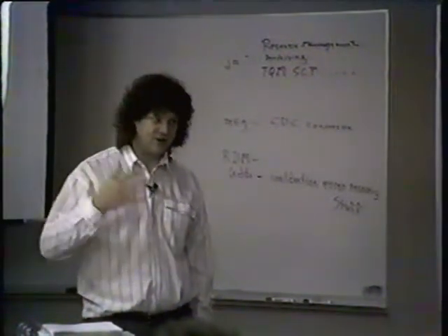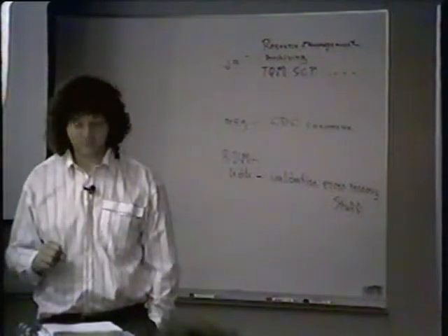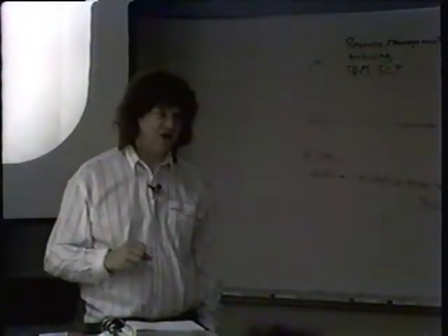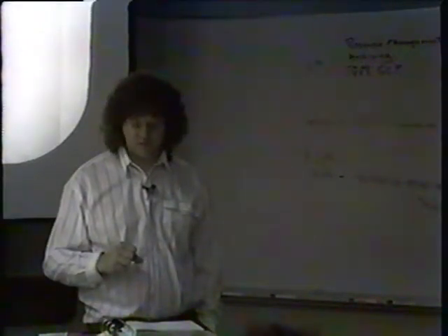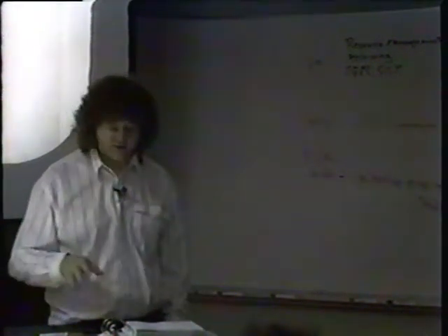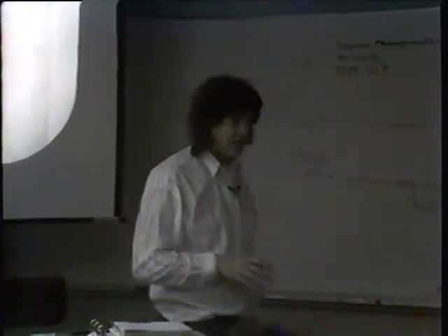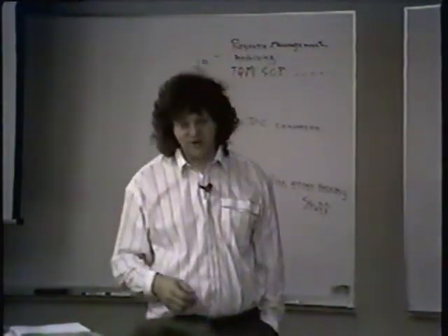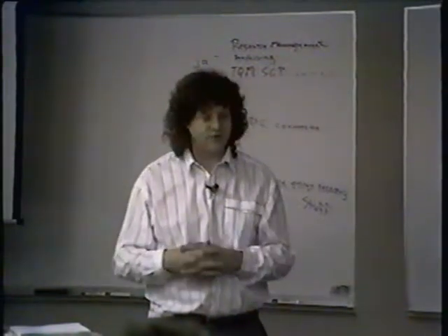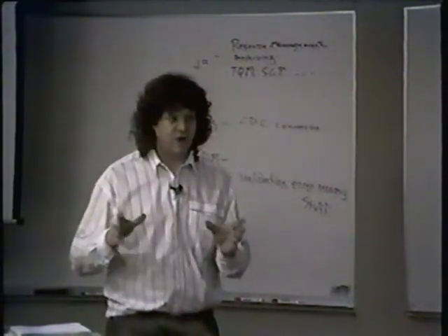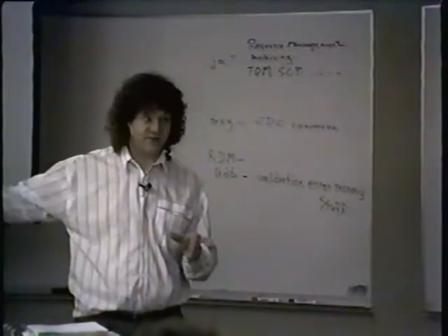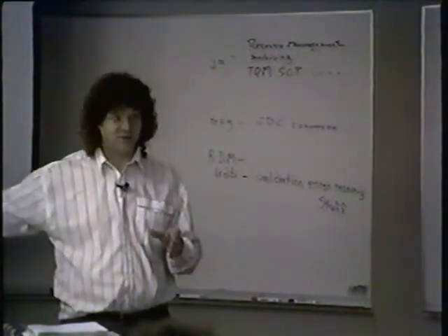But realistically, the migration process really begins maybe 6 to 9 months before the installation, where you want to start discussing interactive versus batch and the various things that we're going to go through. I've put together a Gantt chart in both the migration planning guide and in the section that I'm going to show you, that I think is really an optimistic migration plan. It could be scrunched from there, obviously, but I'm just trying to give some round numbers.